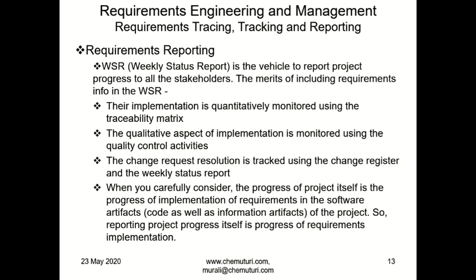And the merits of including requirements in the WSR, weekly status report: First, their implementation is quantitatively monitored using the traceability matrix. The qualitative aspect of implementation is monitored using the quality control activities. The change request resolution is tracked using the change register and the weekly status report.